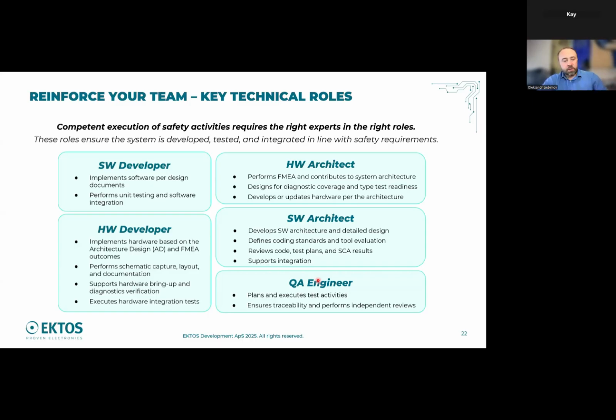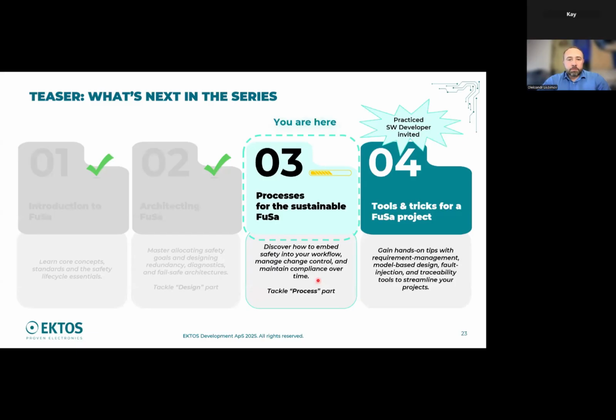And like Vadim said, you need to ensure that, according to the V model, there shall be part of the team that works with the left wing and part of the team that works with the right wing. So you don't have people developing the code and then checking their own code that it's all fine. That one will be hard to justify, I'm telling you. So that's about the roles.